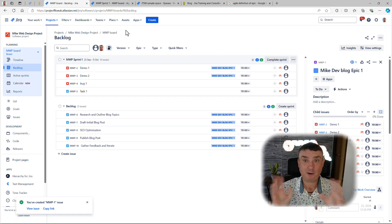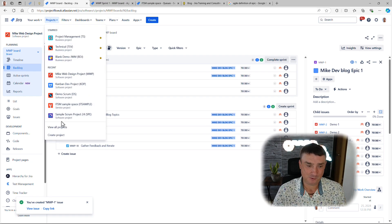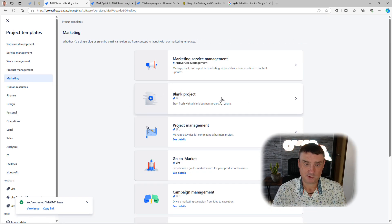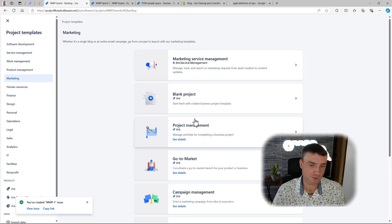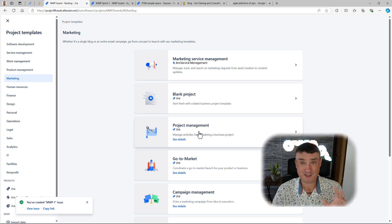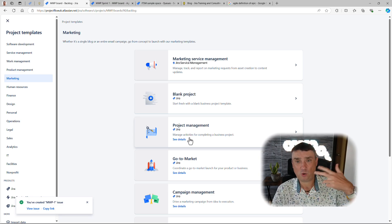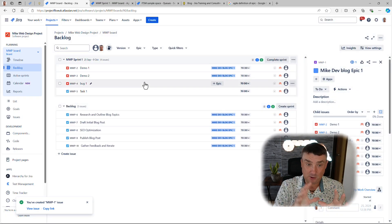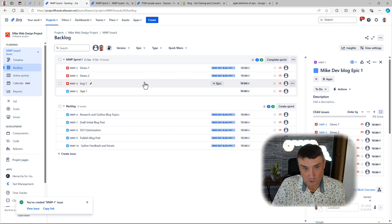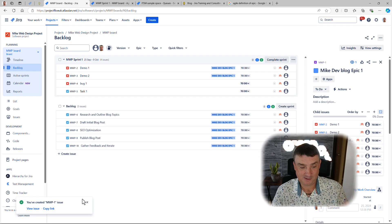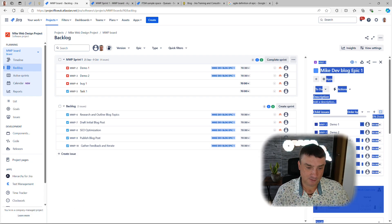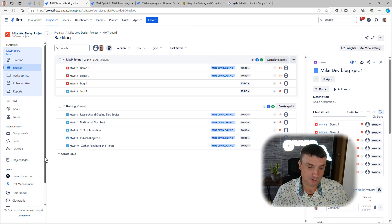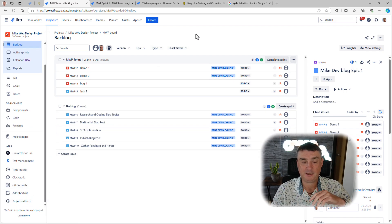So this is actually a really good example of when to create an epic. The process is simple — it needs to be a Jira agile project. Even if you're using a marketing or project management template that doesn't have epics by default, you can always add the epic issue type. If it's missing, go to Project Settings and check the Issue Types. But for a default setup, epics are always there by default.